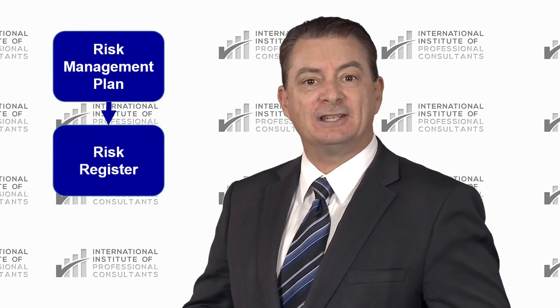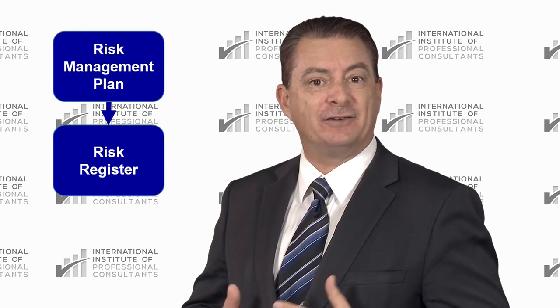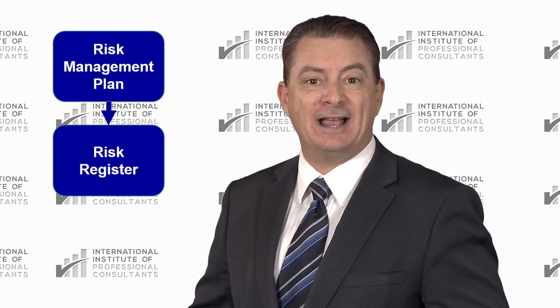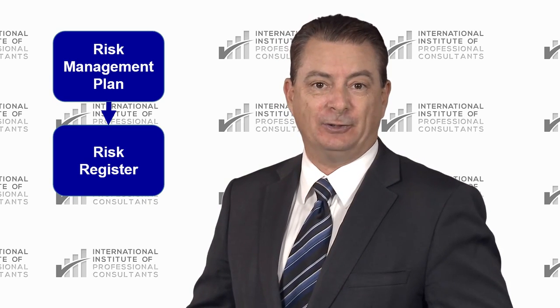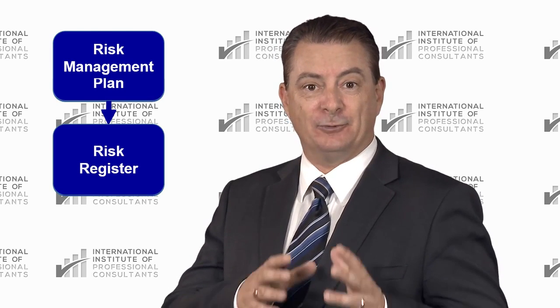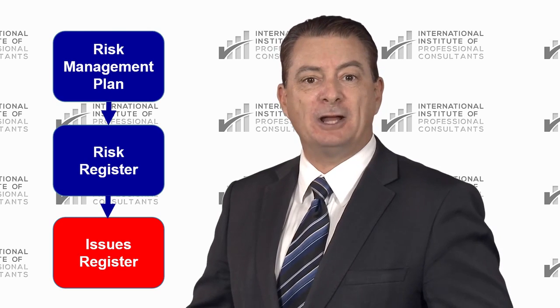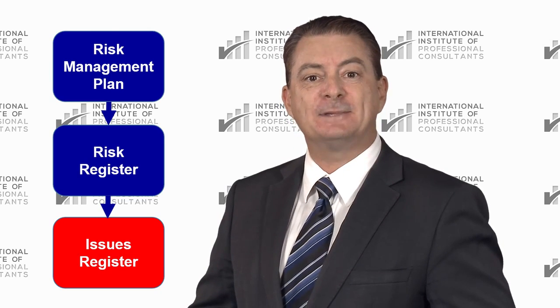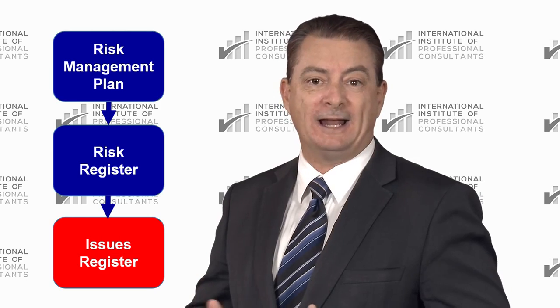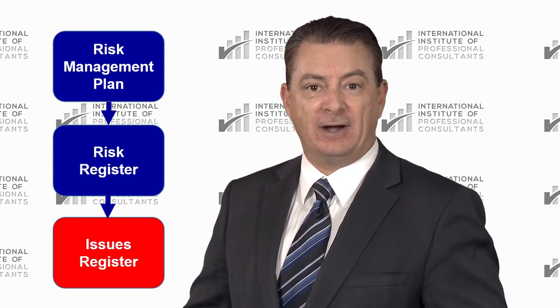And the risk register is a dynamic register for the execution phase of the project. It records all the new risks and tracks the treatment strategies. If a risk event is realised and it has a negative outcome, then it becomes an issue. It is inevitably transferred from the risk register through to the project issues register. Now, corporate risk management plans, on the other hand, tend to be updated by the organisation's normal planning cycle, or when a major event occurs that requires it to be refreshed.